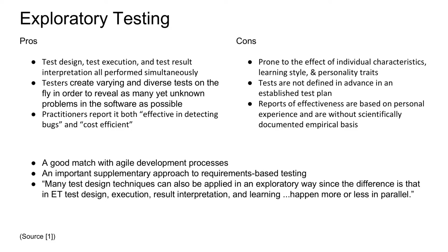Another downside might be that these tests are not defined in advance in any established test plan. In some cases, this is a good thing, since time and resources weren't expended in comprehensive test planning, but as it pertains to initial project cost and effort estimations, the amount of resources to be devoted to ET would be an unknown. And finally, reports on the effectiveness of ET are based on personal experience, not scientifically documented empirical bases. So if you're building a rocket, don't rely solely on an exploratory software testing approach.